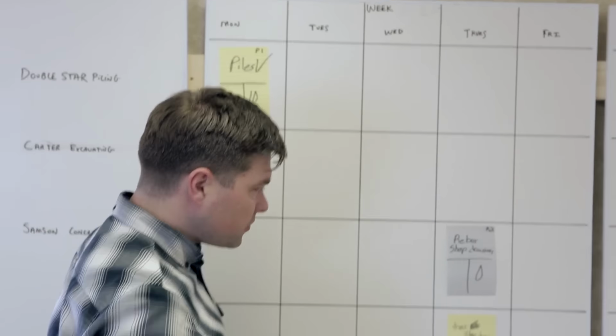We had scheduled originally 18 months and then 16 months, and we ended up moving in 11 months after commencing construction. And then when it came time to do the interiors, we were kind of pushed into a little window. It was crazy, but everybody worked together.